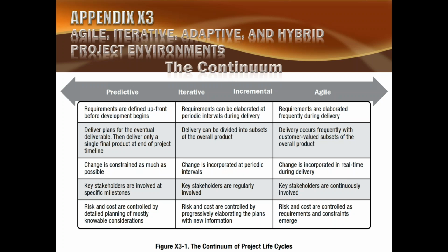And the interesting part is we deliver value in agile. The highest value is delivered first. So initially, whatever the total requirements of the project are, we sort them down into a prioritized product backlog, in such a way that the highest value tasks are on the top of the list, and those highest value tasks are done in the very first iteration. Therefore, the maximum value is generated in the first iteration.